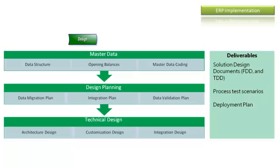The deliverables of the Design phase include the Solution Design Document, the Functional Design Document, the Technical Design Document, business process testing scenarios that will be used in the next phase, and the final deployment plan.